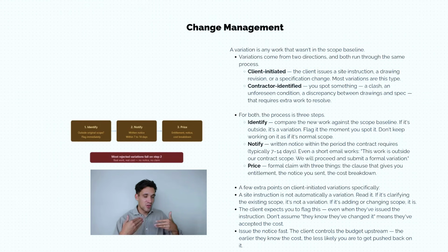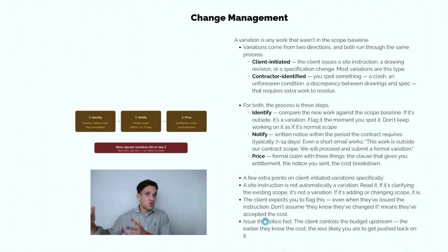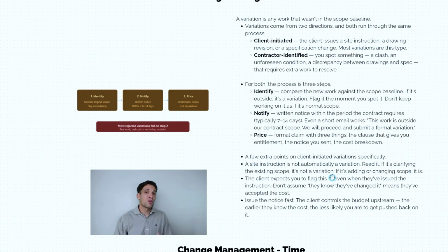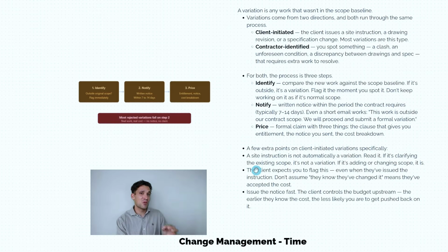Then once you've done that, once you've given the notification, you said we're assessing the cost and time impacts, you then assess that impact. You prepare a cost of the additional works and a duration or change to the practical completion date. Again, that is why you need a really clearly identified cost and scope baseline. So for that example, where we identify an underground service, we might say, well, now we need to have a non-destructive digging truck. We need to excavate and pothole that service. It's going to slow our excavator production rate. This leads to this increase in direct costs. It's also going to take us 4 weeks longer. So we need to cover the costs of our project manager and project engineer who are on site for 4 weeks longer. Plus, we want to change the practical completion date. So that is the assessment and the pricing and the variation.